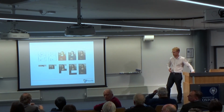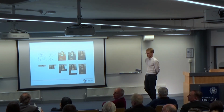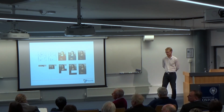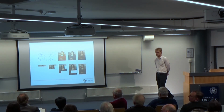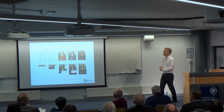Where I got to in my mind though was that if you're going to iterate this and change some functionality, then you're having to rebuild part of what you've built already. So by rebuilding something, you're adding more cost because you're taking away something by replacing it. But I suppose the advantage is that you're making sure it's about right before you go too far with it, and you're saying that's more valuable. So yes, because you're redoing stuff, there's obviously a cost to that.